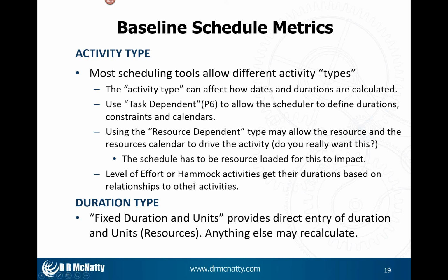Take a look at level of effort or hammock activities, depending on the tool that you're using, and make sure that the durations are based on the relationships with other activities. Usually I want a start to start and a finish to finish to drive that summary level.